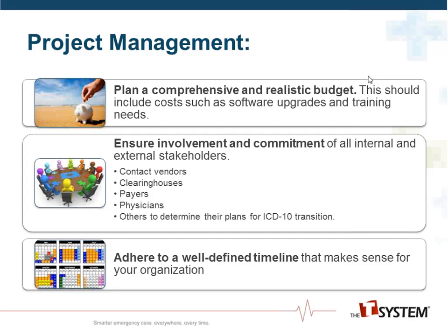There are concerns relating to productivity from coders with ICD-10 coding, as it typically takes longer to code in ICD-10. Some coders plan on retiring prior to implementation. Is your organization adequately staffed? Be prepared for a bottleneck in claims processing after the implementation date. Included in this budget might also be the industry standard 3 months revenue in reserve in preparation for possible claims delays associated with the implementation.